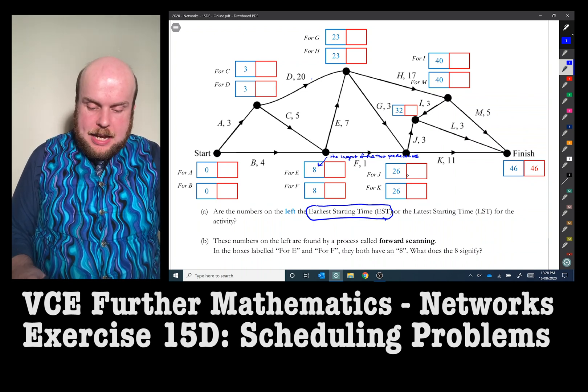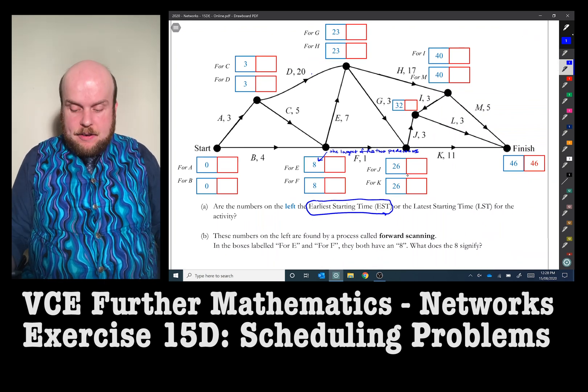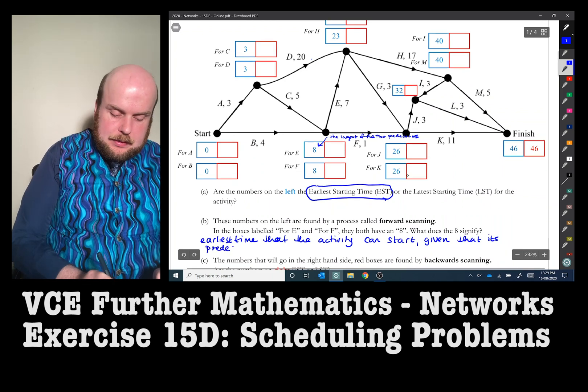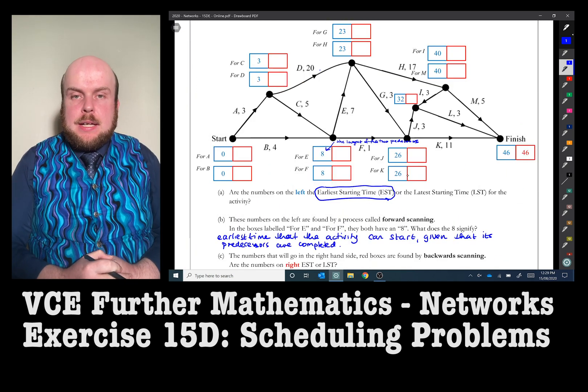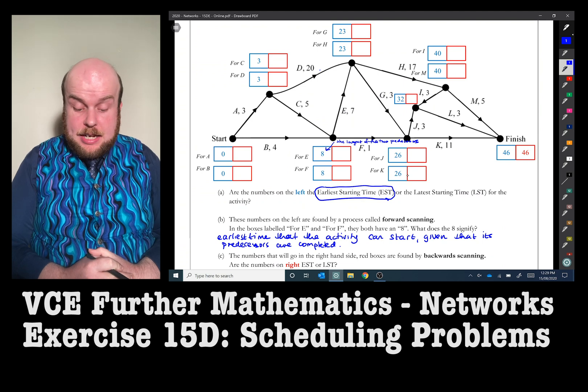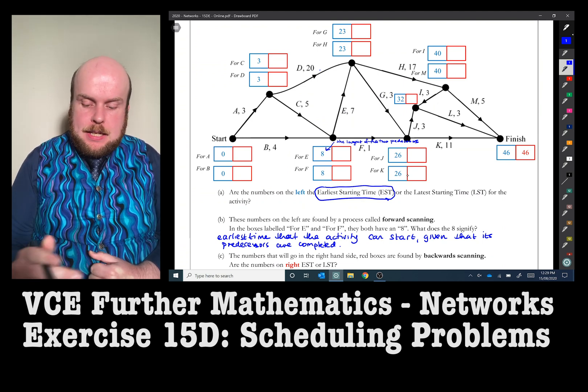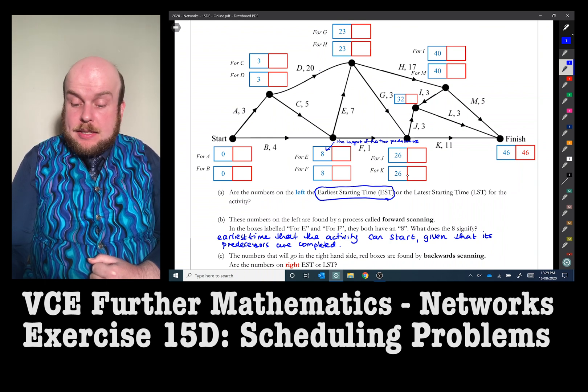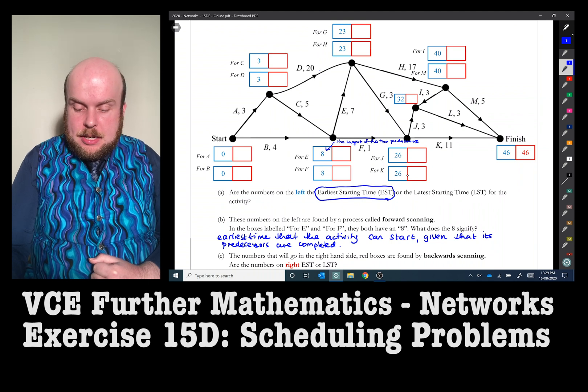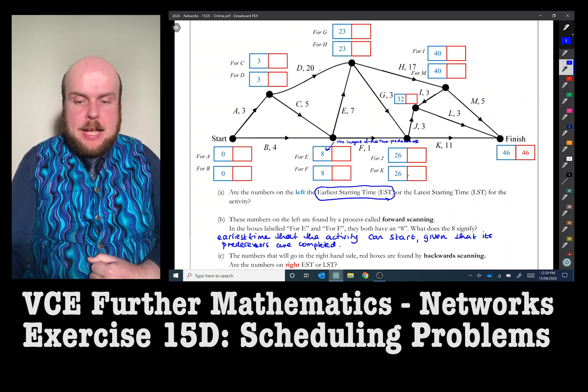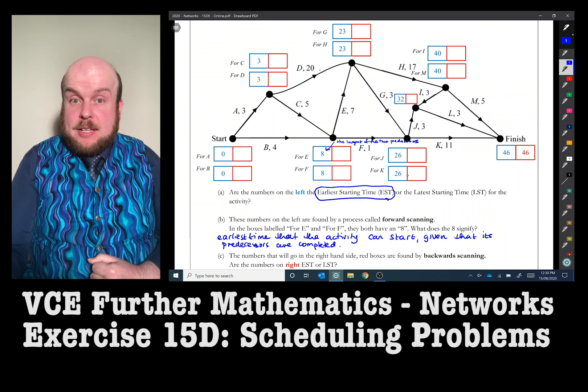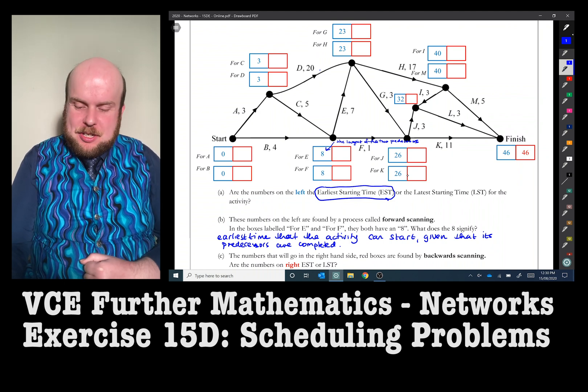So hopefully we can now see that what these numbers on the left signify. They are the earliest time that the activity can start given that its predecessors are completed. So when it gets to this, when we look at H for I and for M, the minimum time there says 40, because there's only one way we can get to I and to M, which is 40, because it's 23 plus 17, which is 40.